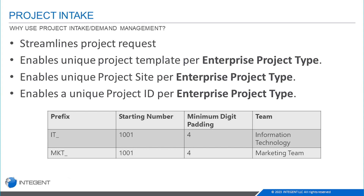The ability to have multiple Enterprise Project Types allows us to have a unique project site per type of project. The project site can store documents, issues, risks, and so forth. You can pre-populate the project site with different types of project collateral per Enterprise Project Type. You can also change other things within the project site to make them very unique, so an IT project type and a marketing project type can have very different project sites.